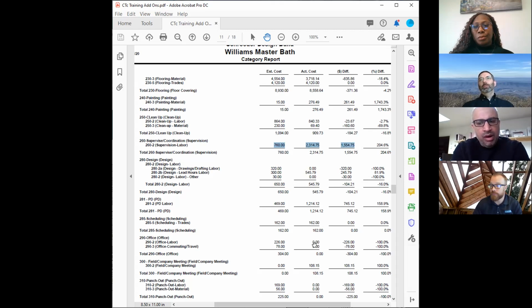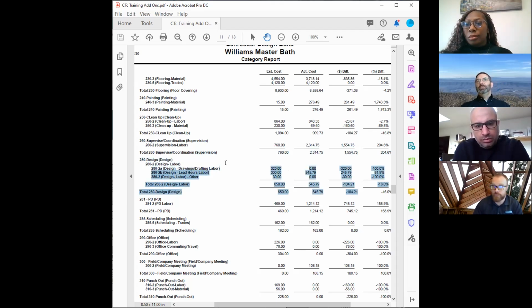So you want to do the same thought process down here. In most cases, you'll have spent all your design money. Your designers will be out by the time you get this far in most projects. But you would still have some PD time and some supervision time you're going to have to spend here. So if you went in your job cost and said, I'm going to be $1,554 over on supervision, but you had 3 weeks left in the project, you would be understating your supervision at that point, because you're going to be over there for 3 or 4 hours a week for the next 3 weeks, which means you're spending more than the overage.